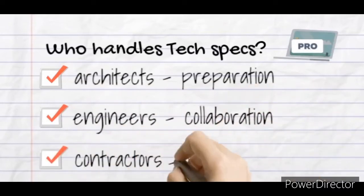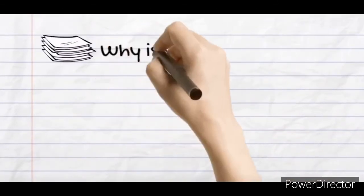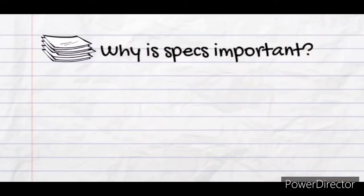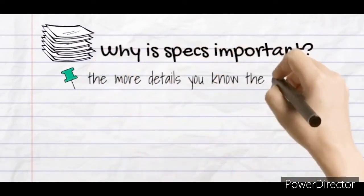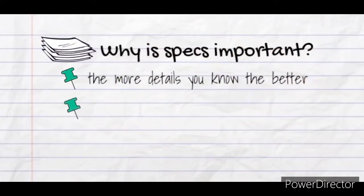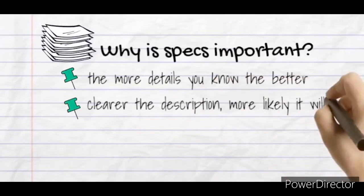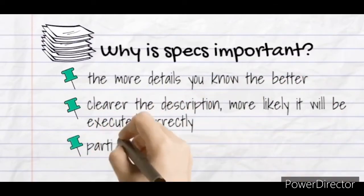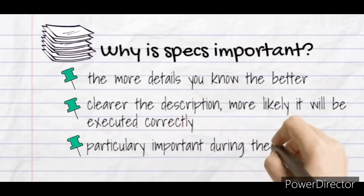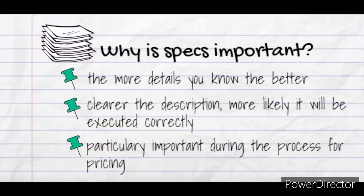Why are specs important? First, the more details you know the better. Second, the clearer a description is, the more likely it will be executed correctly, which reduces risk in construction. Third, it's particularly important during the pricing process — with solid specs, the contractor should have no doubt about pricing.